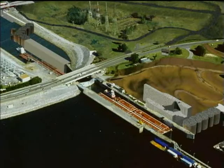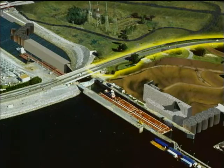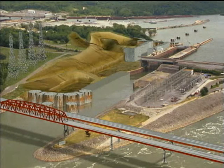The partial permanent east bank embankment. This structure provides a second line of protection against Kentucky Lake pool loss. Its construction permits removal of the existing highway and railroad embankment that serve this function through the early stages of construction. Downstream and middle lock area excavation, including excavation of the existing highway and railroad embankment, totals some 1.1 million cubic yards of material.